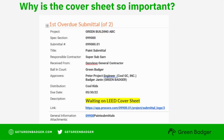It's really important that you provide this information. Otherwise, product data tends to get lost in translation. This can have a negative impact on the submittal review process, which can lead to delays, penalties, and the dreaded revise and resubmit throughout the submittal process.